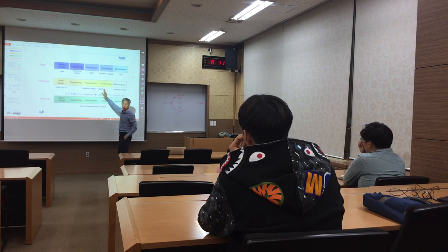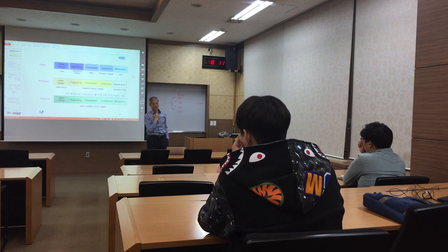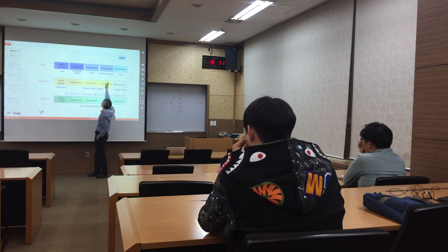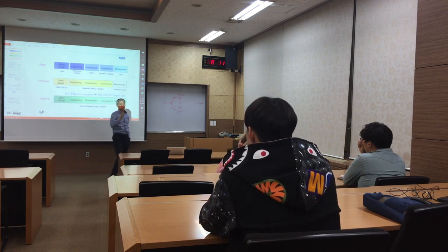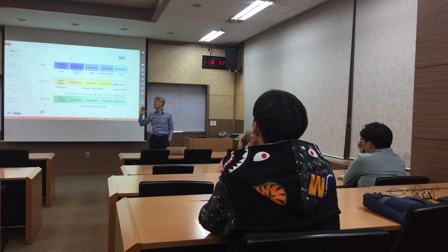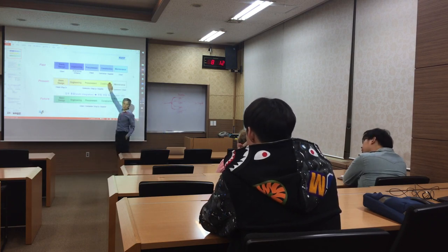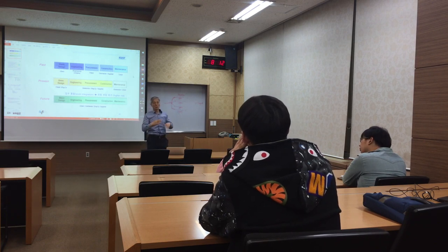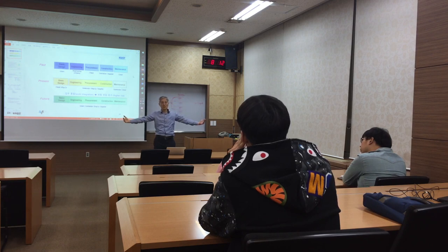But this one is trying to explain the contract, the responsibility of the contractor. In old days, different companies, an engineering company, a procurement company, a construction company, had separate contracts. Say Samsung Heavy was working only for construction in many, many cases. But nowadays the situation is changing. So the contract is more a lump sum contract. Big responsibility. Big money contract.